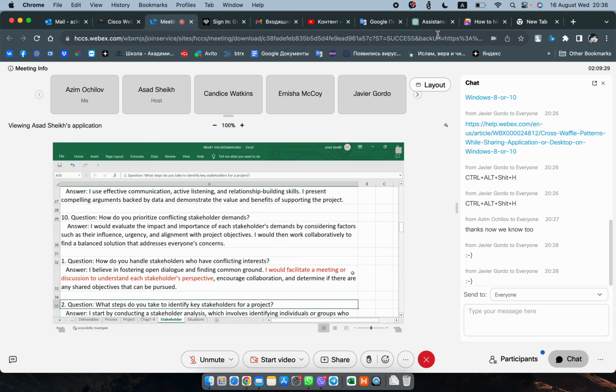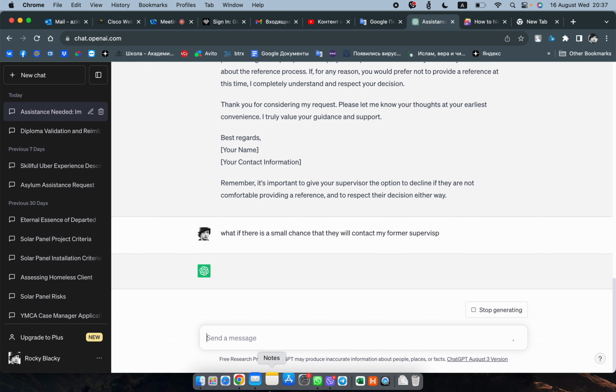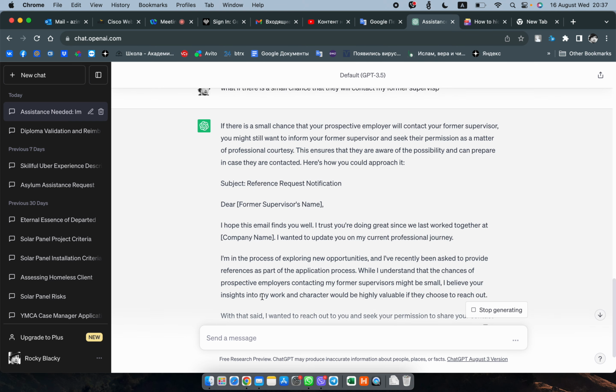There's no change control in sprints, right? Either they can do it or they cannot. And if they don't have time, they can just say no, it cannot be done. In predictive, there's a change control, and you're going to go through the impact analysis. In Agile, during your sprint reviews, if they come up with a new feature, a user story, you can just say we ran out of time, we're going to do that in the next sprint.